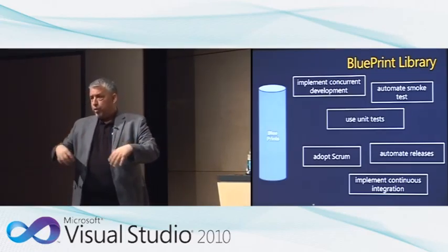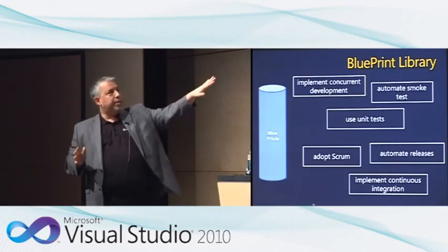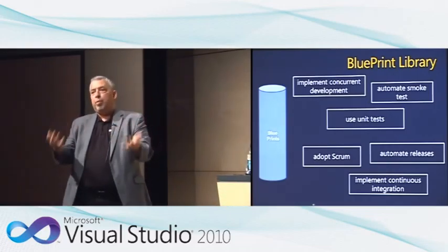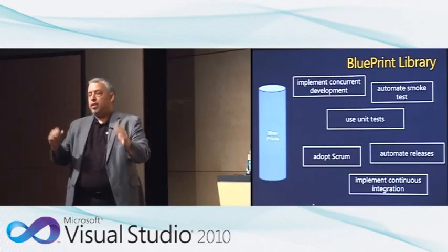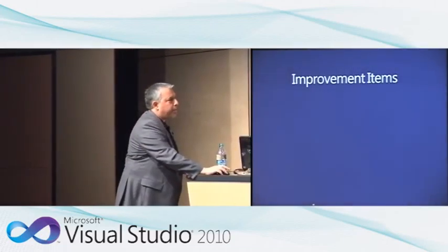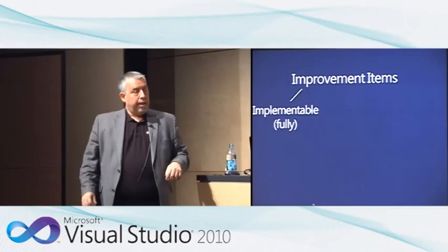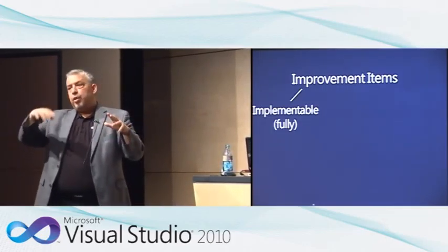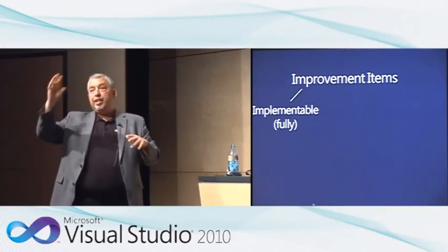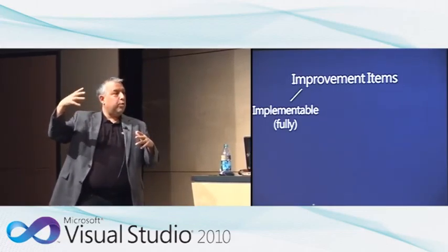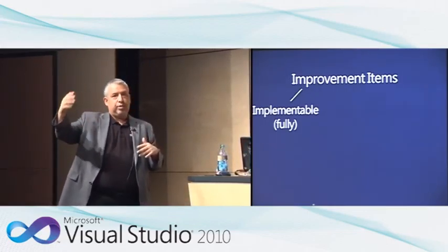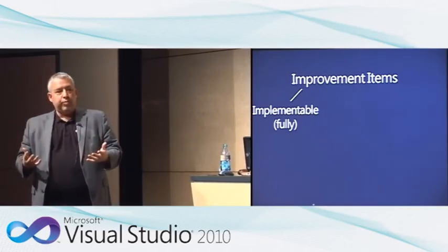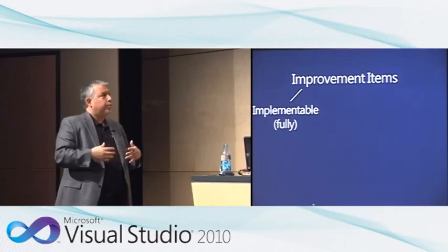But when you go forward, the key is to break them down into a series of initiatives that you can implement into your 4 to 8 weeks iteration. So when we're looking at our improvement item, for those who are Scrum practitioners, we have INVEST, which is basically what a good requirement is: independent, has its own value. We did the same idea for our improvement items.